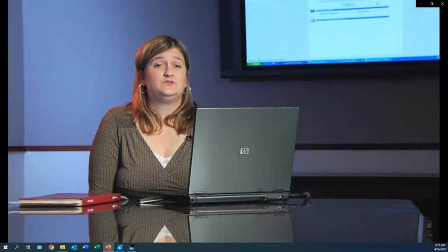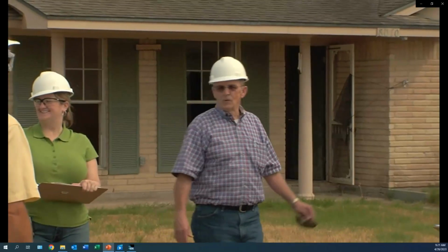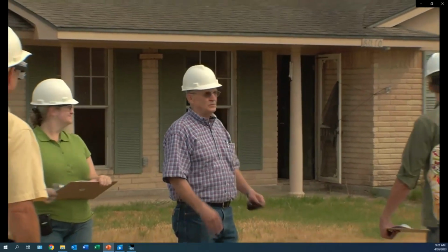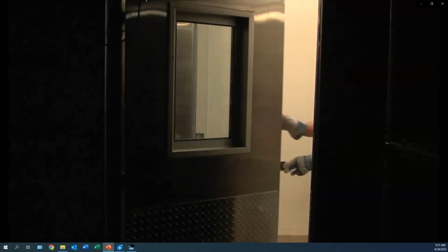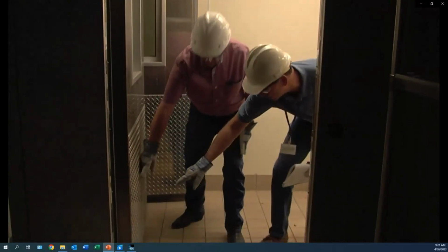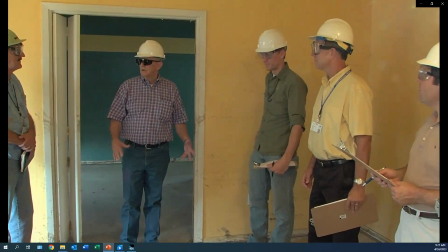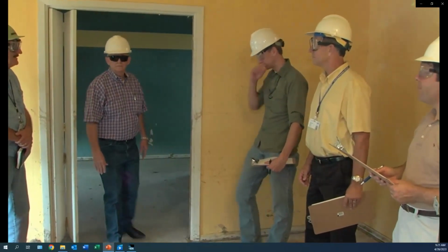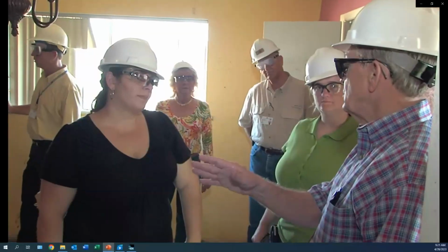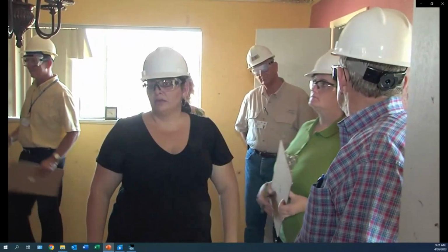One of the last steps of the training should be a field visit or a pilot visit to some damaged structures. You're going to want to look at 1 to 3 residential and probably 1 to 3 non-residential structures. This gives the class a chance to actually apply the knowledge they've learned in the classroom in the field. An experienced instructor should be there with the class in order to watch them do an assessment and give them feedback on their findings, just to make sure that they're doing it correctly and that the numbers they're coming up with are accurate.